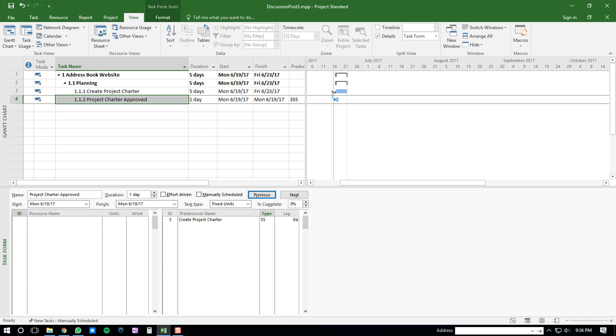you'll see that there is an arrow going from the one task to the other, which is demonstrating the start-to-start dependency, and then you'll see that the predecessor column has 3SS, which means it is dependent on the third task, and it is a start-to-start dependency.